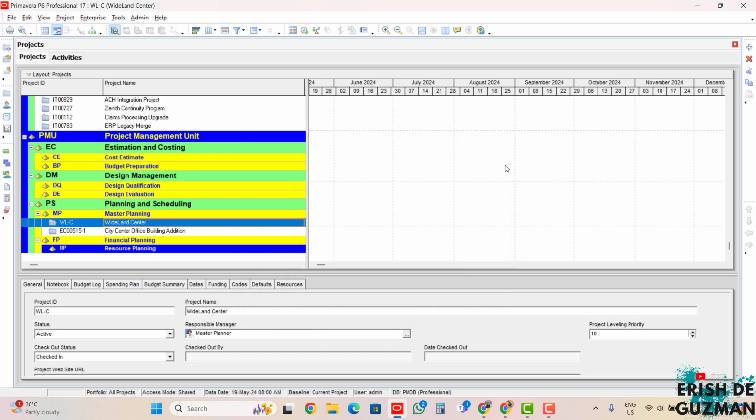One file type that can be imported in Primavera is the MPP. This is the default file format that the Microsoft Project software uses to create and save files. There are three different formats from Microsoft Project: Microsoft Project 2010, 2007, and 2002-2003.